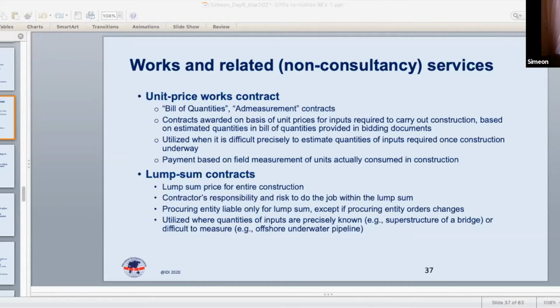Structure of standard contracts. So the standard contract documents in the standard procurement documents of the World Bank and other institutions, and now many countries who have adopted this type of system, there's the general conditions of contract, which are immutable and are not to be changed from one procurement transaction to the other. And those are accompanied by the special conditions of contract, where various details that are not defined in the general conditions of contract are specified in this special conditions of contract document.